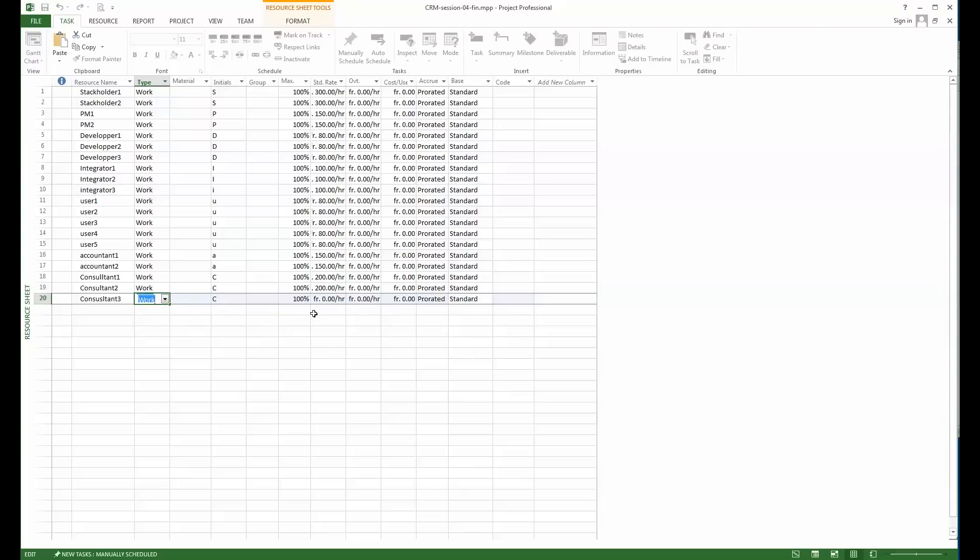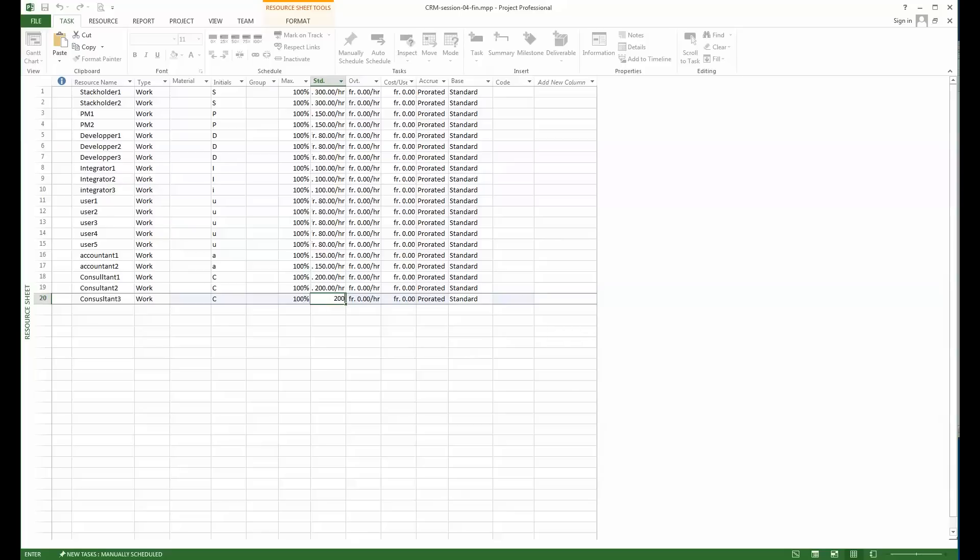Here I will put the rate. I decided to put 200 as a rate. You do that by keying in 200 and then the slash and then the unit. It could be per day, it could be per hour. 200 is here per hour, so it's a slash h. Once this is done, the resource is defined.